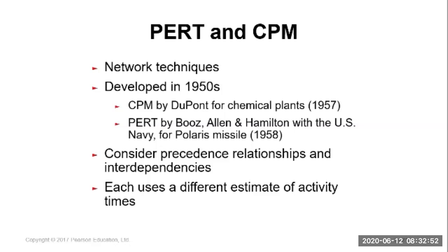Finding the information depends on your topics. When you complete the topics, then you can find the information. After you find the information, then you can start to write up your assignment. You cannot write up before you find the information. Before you get the information, you cannot start to write your assignment. After you complete the assignment, then you can bind or, let's say, print. So you cannot print before you write up your assignment. That is a precedence.